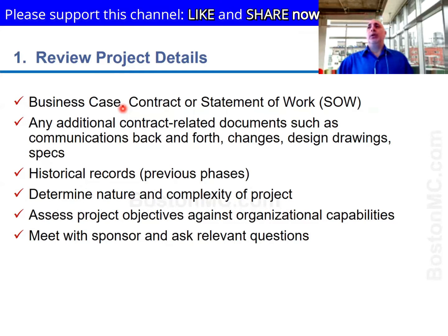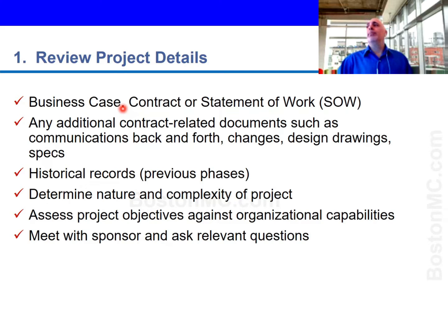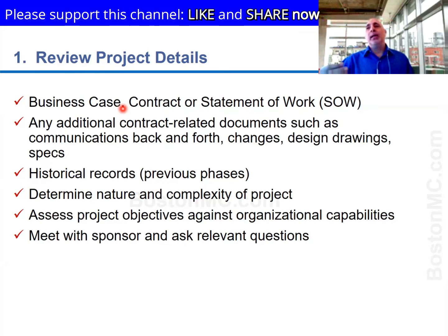Why? I want to know why we are doing this one project. Why is it important to the organization? Mind you, as a PM, you don't decide for the organization what is important, but it would be in your interest to know why this thing is important to the organization. Because if you ever have to make a change along the way, you have to make sure the change doesn't defeat the purpose, that it is still aligned with the overall intention of that one initiative.